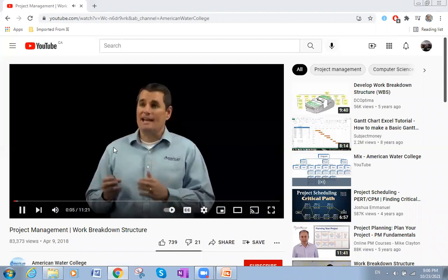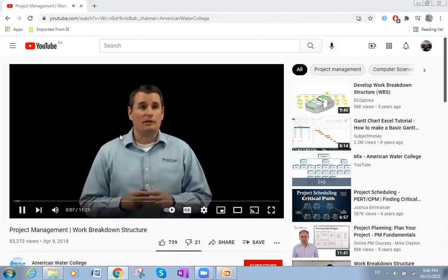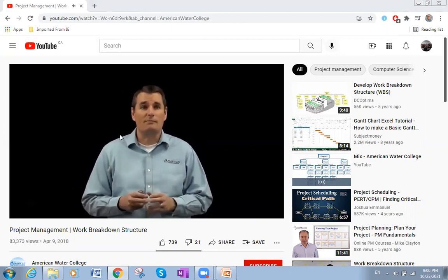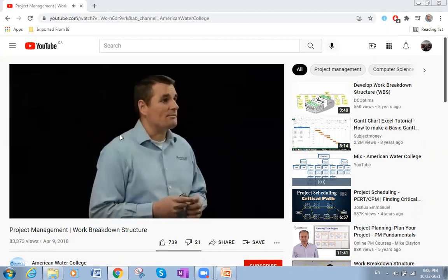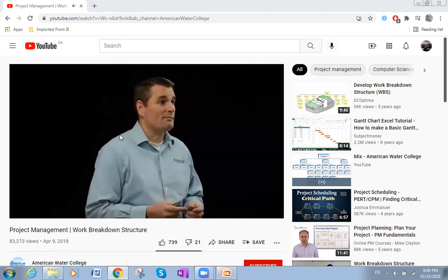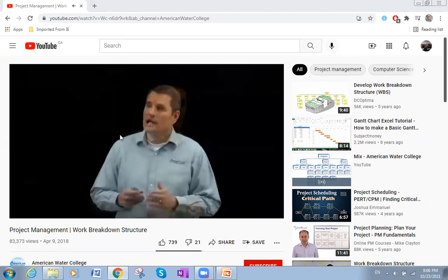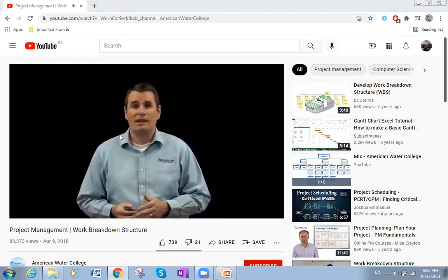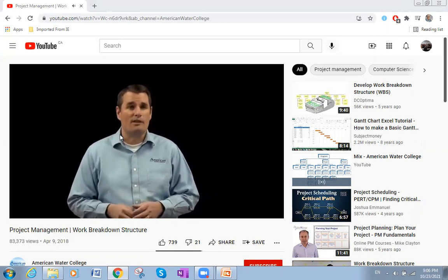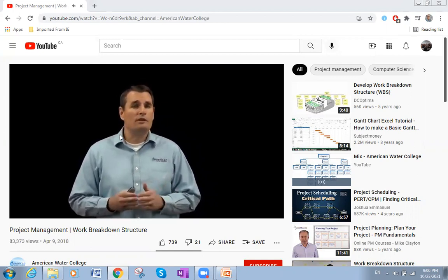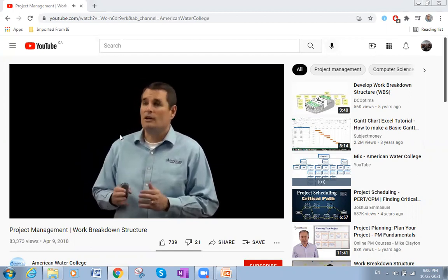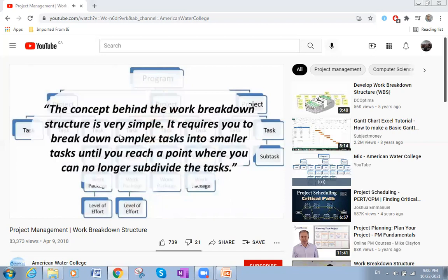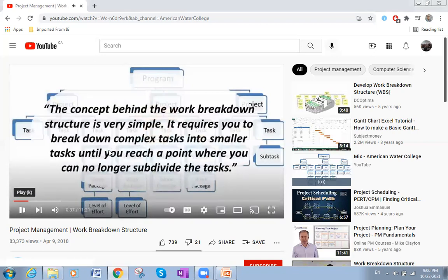Once the problem has been accurately defined and possible solutions have been discussed and then decided upon, and a project risk plan has been developed, an accurate estimate of the required resources and cost to complete the project is the next step. The leading cause of project failure is inaccurately estimating the time requirement and the cost involved with completing the project. A wonderful tool you can use to help with estimating is called the work breakdown structure. The concept behind the work breakdown structure is very simple. It